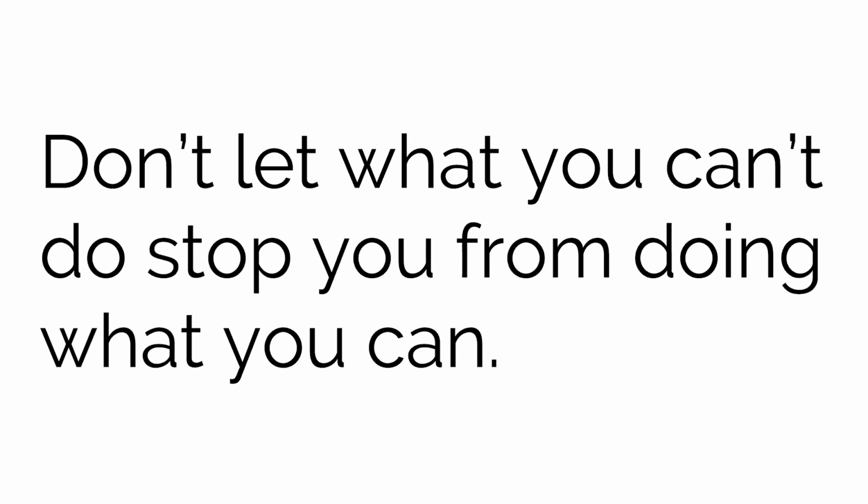And even if you don't want to get into the world of GIS yourself, when you're doing projects with outside consultants, so engineering firms, maybe you add an extension to your system, make sure you always get a copy of the digital information that went with that project, whether that's a CAD file or a GIS file, because even if you can't use it now, somebody will be able to use that in the future.